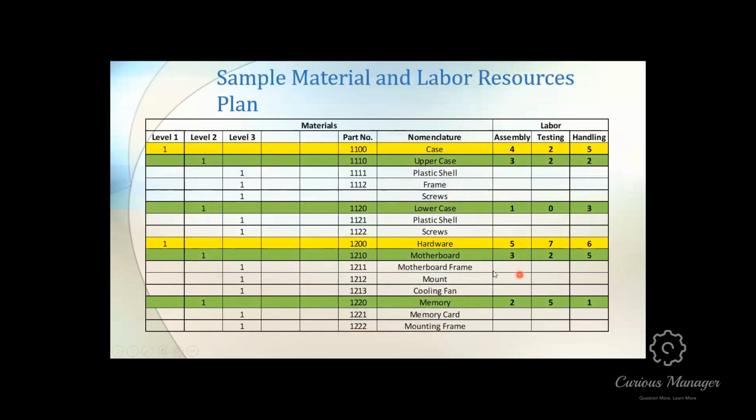And this will only add up to level 3. So you can automate a spreadsheet to make this very easily. So as you change your operations plan, let's say you miss a step, or you find out through your dry runs that you use more hours for certain things, you change the hours, and all of a sudden, all of your hours will automatically change. So you can use Excel to do this for a very basic one.